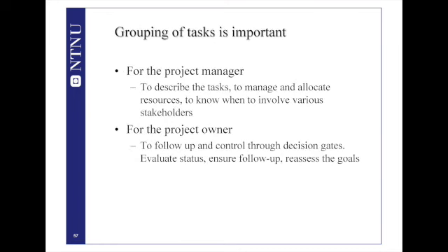This kind of grouping is important for two main reasons. The first one is to be able to manage and allocate resources. You say that for this group of tasks, we need engineers. For this group of tasks, we need, for instance, analysts. For this group of tasks, we need carpenters. For this group of tasks, we need software managers, and so on. So it's a way to manage your project, to know what resources and when to involve them and what type of stakeholders you have, okay?